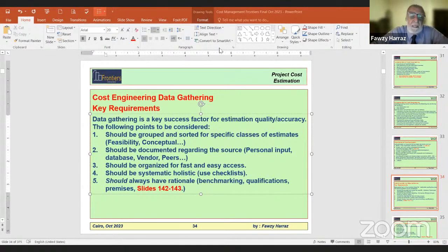Just to tell you a story about this, a real story. Badr El-Din Petroleum Company in Egypt, in the Western Desert, issued a tender for an EPC contract, and 3 bidders quoted: ABB Lummus, Bechtel, and KBR, Kellogg Brown and Root. The numbers came like that. Lummus bid 250 million, Bechtel 255, and KBR 175. So apparently all 3 are professional. Apparently, the market price is something between 250 and 255, very close. But 175 is dramatically below the market price.